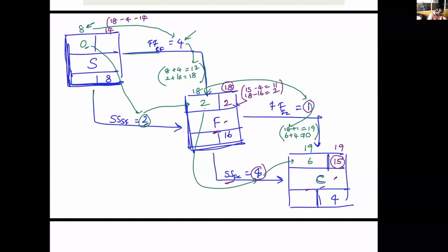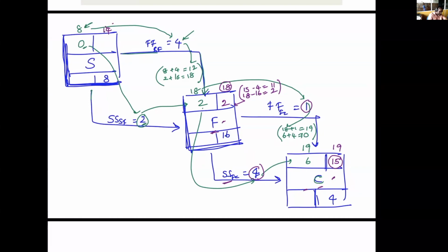So this is 14. Again, for this cell, 14 minus 8 is 6. That's for the duration. 14 is this, 8 is this. And we should respect the start to start link as well. This starts at 2 and there's a start to start link of 2. We have to take 2 minus 2 as well. So it has to be 0. This is a bit hard and the figure looks complicated with the way that I have drawn it and explained. We'll stop it here.